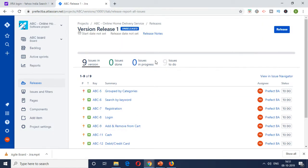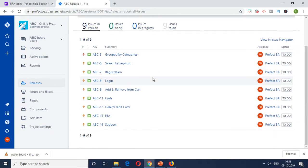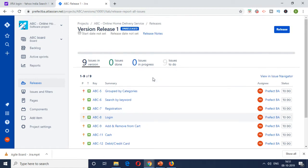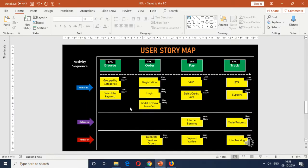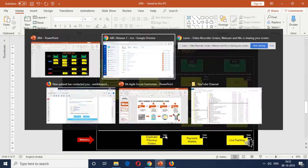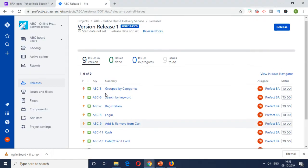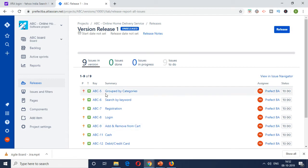So this is how you do kind of release planning. So in order for us to release this particular version of the product to the public, all these items need to be delivered. Similarly, the remaining five items can be tagged accordingly to release two and release three, and then it can be tracked to closure. So this is the release planning.